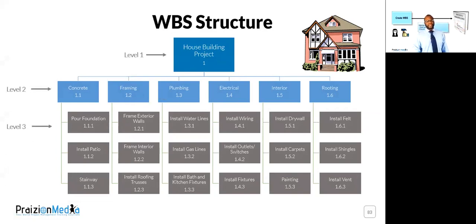But not every WBS is a 3-level WBS. Some WBSs have 7 levels, 5 levels, you know. For example, a weapon system that I worked on in a company, name withheld, but the WBS was broken down into many, many levels, 7 levels. And we actually had a contract work breakdown structure that the entity we were working with said it must match this contract related WBS. We want to be able to track stuff. So the WBS could be very, very helpful in identifying all the pieces of work that have to be done, all the pieces.